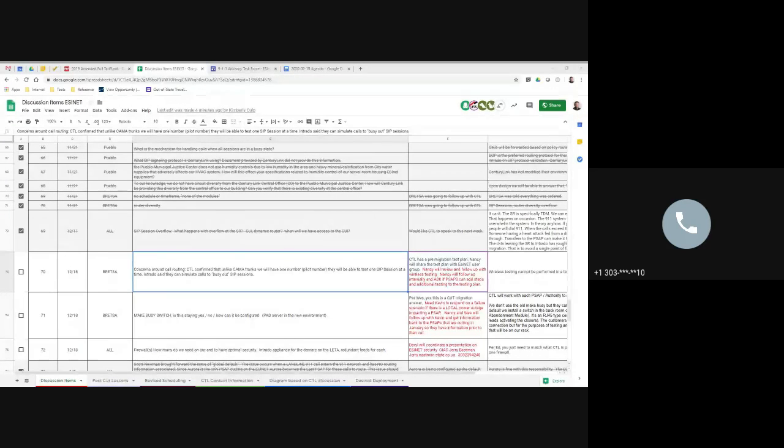Provide that to everybody, as well as a summary snippet of their specific project plan and where we are with those milestone tasks, so that everyone has an understanding of where their project is, when they should expect, based on their targeted cut date, milestones like kickoff calls, circuit orders, and PSAP surveys to occur, and when more regular project-specific communications or meetings should start to happen with their specific jurisdiction, and clear up some of that confusion and provide a more planned and expected communication path for everybody.